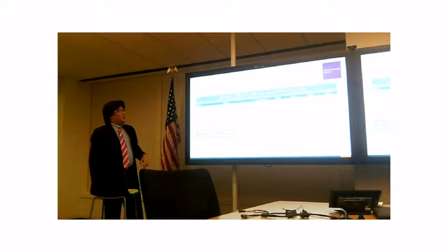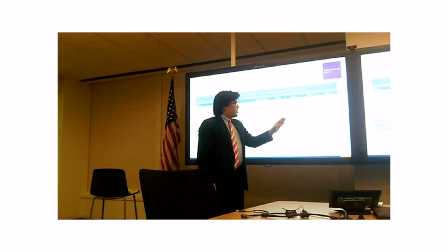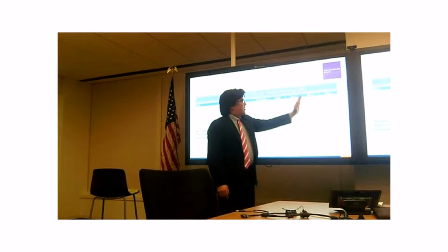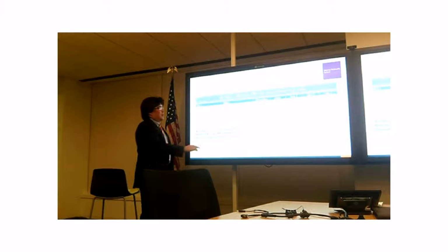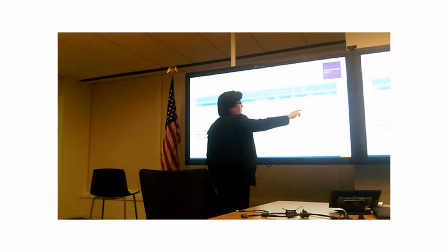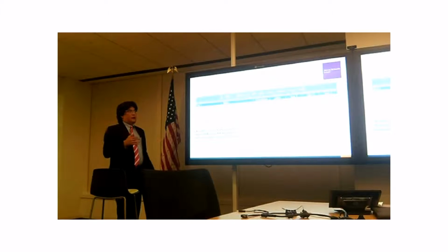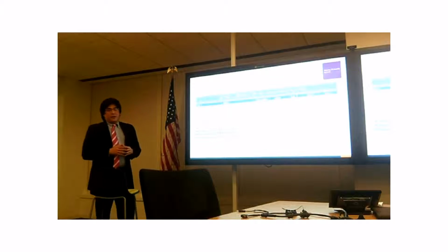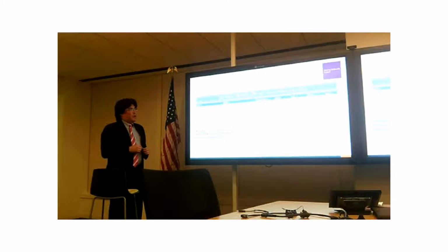The eliminated web conferencing solution is, as you can see here, $100,000, and then over time, users were taken off the system. So you see a staggered $150,000, $200,000. So that means that in benefits, you have this gain: $200,000, $150,000, $400,000, $450,000. This is an example of how cost reduction is interpreted as a benefit. This is the way that Forrester does this. If you were to estimate soft costs, it would be very similar, but you would have to break these down into what the metrics of that soft cost were.